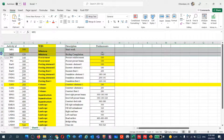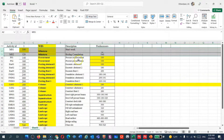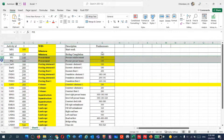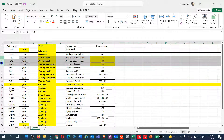'Pledge Completion' is tied at the end after you finish everything. The ID for 'Clear Site' is 540, and these are the milestones. Normally a project manager or high-level engineer doesn't have time to go through the entire schedule — they can just look at the milestones and know the project duration, start, and finish.